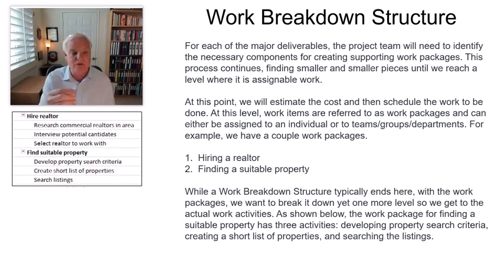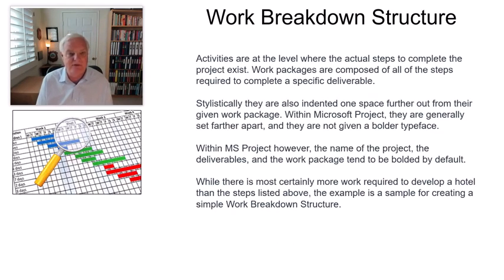You can see that you may need to blow some of these out and create subtasks on subtasks, depending on the level of detail required. Now remember, activities are at the level where the actual steps to complete the project exist. Work packages, remember those, are comprised of all of the steps required to complete a specific deliverable.